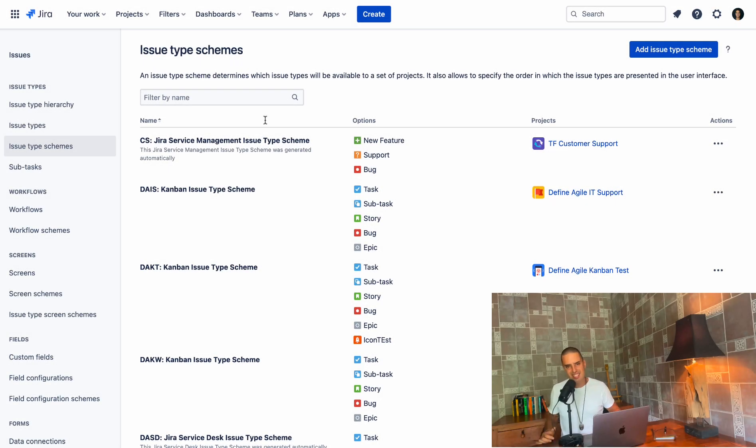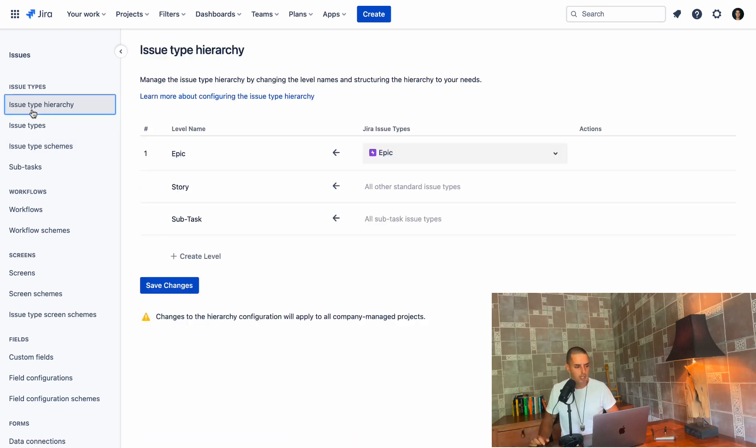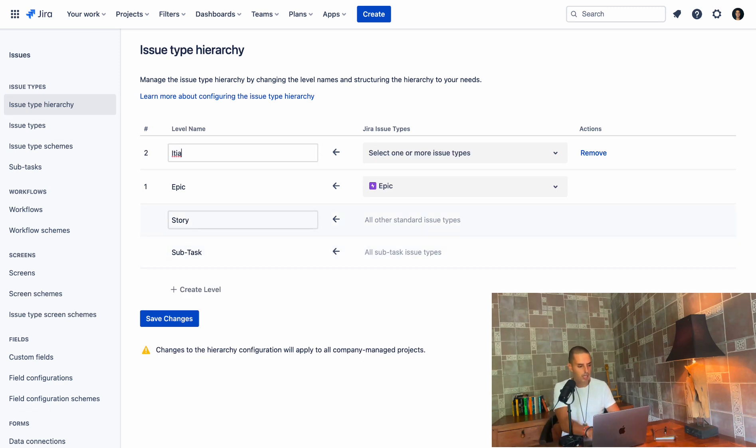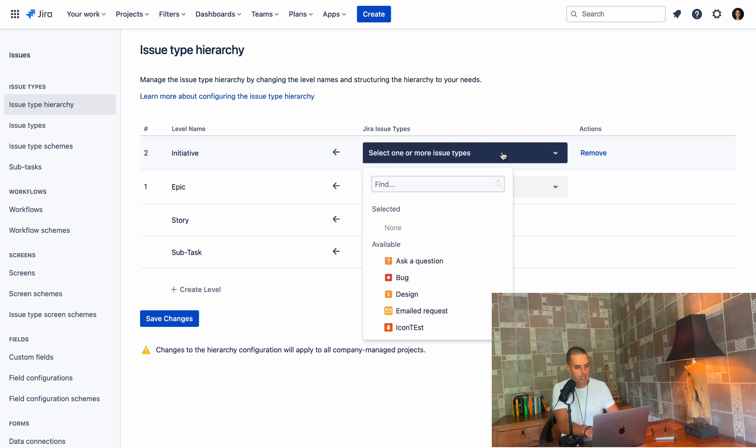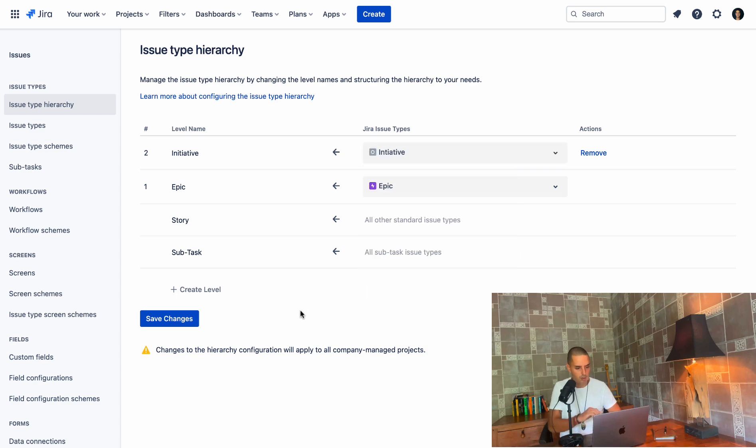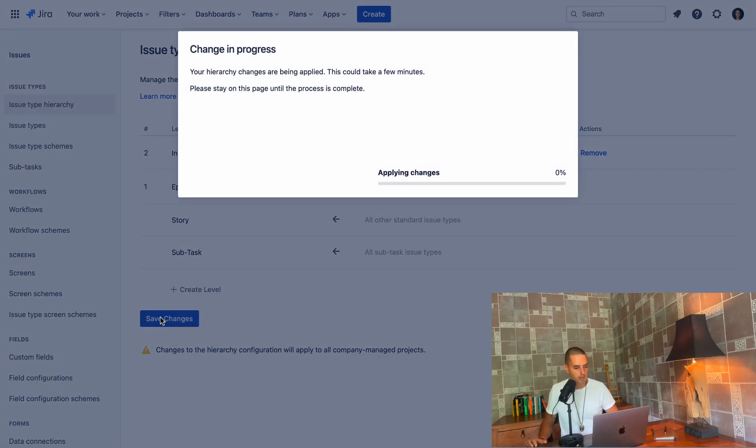So once this is saved, we can actually create a hierarchy. We click on issue type hierarchy, which is only available for premium, Jira premium, so make sure you have it. Click on issue type hierarchy, and then you click on create level. Then you say level name, initiative. And then you select one or more issues, and I want this to be an initiative. So we see that above Epic, we have initiative of the issue type initiative. We click save changes here.